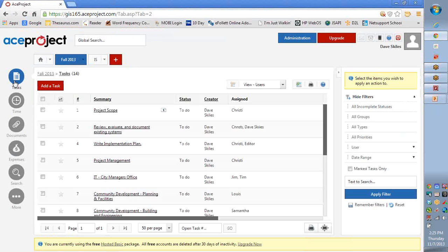Okay, so do you have an estimate, okay, so you've got 8 hours. Did you put together any estimate for labor costs? That's what my cost of labor would be, about $30 an hour. Right. And then with the multiplier, so about $90 an hour to go out there. And so factoring in about 8 hours at 3 days of travel, 24 hours, so that's a little over $2,000.